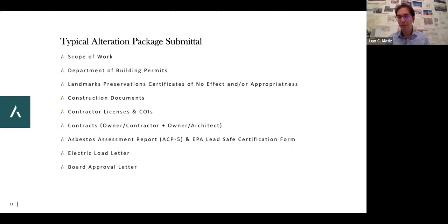And the key is also, whenever renovations take place, just being a proper good neighbor will save a ton of stress. Letting people know when the noise is going to take place, putting up notices about the dust, and just being good, that goes over really well. Because the other thing that I've seen happen with renovations is contractors who don't follow the rules and make a mess, and they wind up stopping the jobs for a couple of weeks, just by not putting masonite on the hallways or whatever it might be. Laying down the law for contractors is really important.